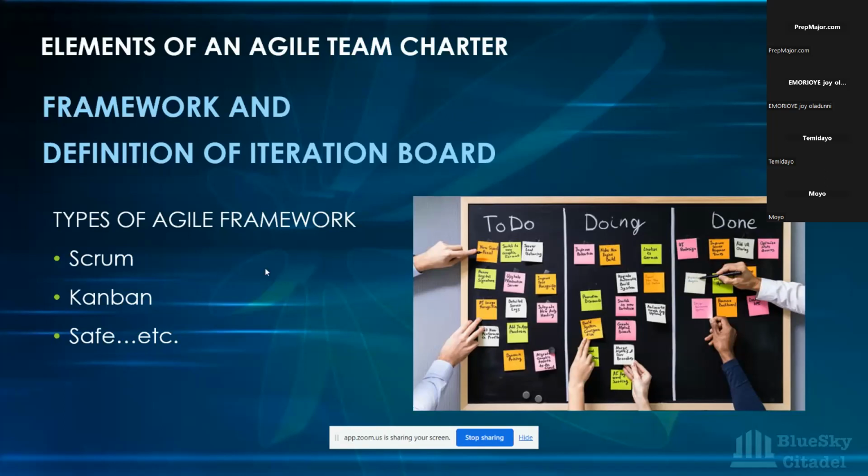So at every point of production, there are statuses on your board. It could be to do, in progress, or done. For example, if it's a Kanban board, you go from to do, to in progress, then you move into done. But if it's a Scrum team or a Scrum framework, you can add more things like in BA, approved, committed, in development, in QA, in UAT, done.